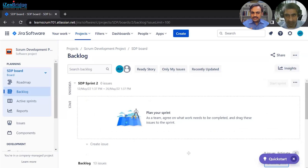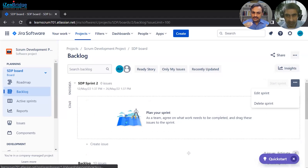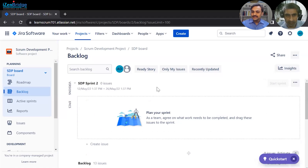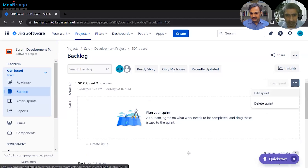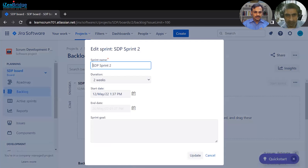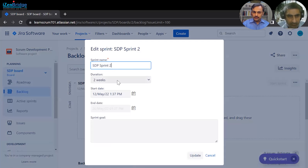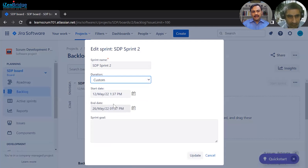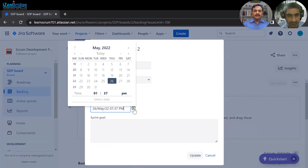If you have been using sprints already, Jira will automatically create the next sprint by taking the finish date from the previous sprint. You can edit it if you don't want to continue the same way. But if you are doing it for the first time, the start and end dates may not be populated. You can click 'Edit Sprint' to change the start date, and you can set either a sprint duration or select a specific end date.